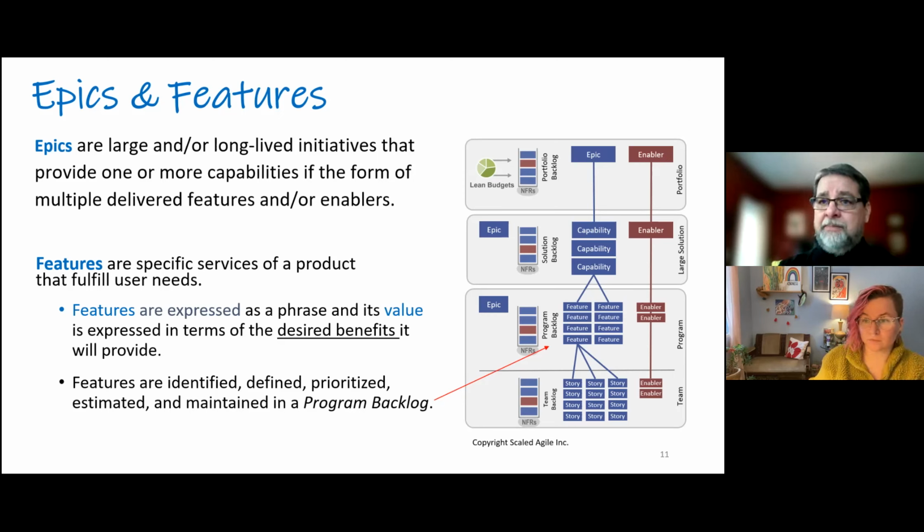It's also not the product, but there are things that you need to do in order to hit the end goal, the big idea, the conclusion at the end of your research project. So it's important that you identify what those things that support your research, but are not the research, and those things that are the research, and then identify the dependencies. That's going to help you sequence as well the work that you do and identify what's important.